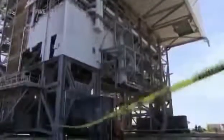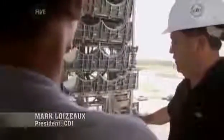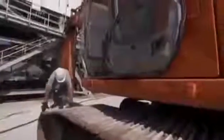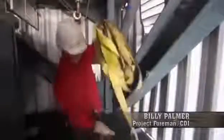Every piece of conduit, everything, every hydraulic line, every fire line must come out on the floors where we are moving it. Kevin and the team set to work. The first job is to attack the aluminium sides of the tower. Only then can they get to grips with the insides. If I could just pop two holes and cable it and rip the whole wall right out, I mean, that saved me a lot of time.